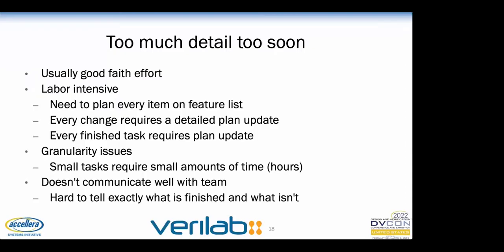The team ends up spending a lot of time putting together estimates for each line item, leading to a huge list of small tasks. One pitfall of this type of methodology can be that while each list item has an estimate, there are a lot of infrastructure tasks that need to be done but aren't included as an item on any of the lists.